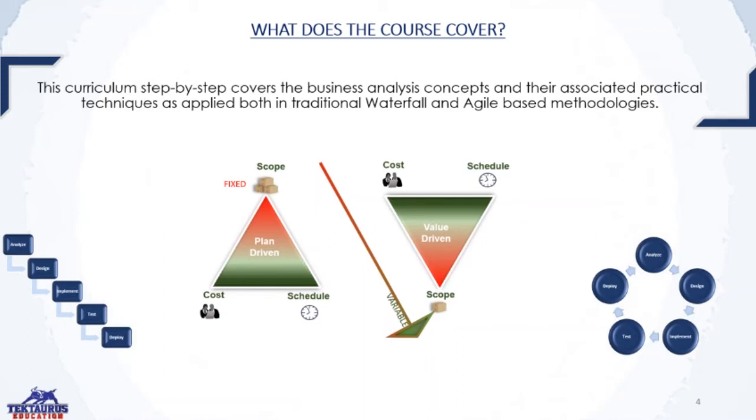We will have a very simplistic skeleton functional website where we are going to sell only, let's say, clothing. Then we will add shoes later. We'll have cosmetics later. So we go by product, or however you want to slice and dice your project. But small pieces of functionality we take, and then we incrementally deliver those pieces of functionality using the cyclical cycle. So the process remains the same.